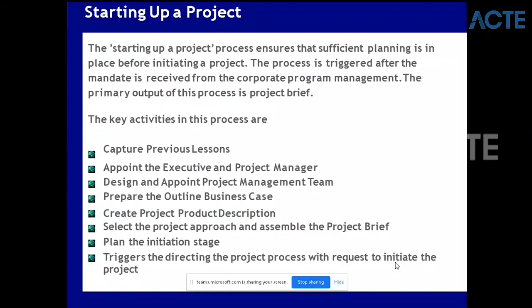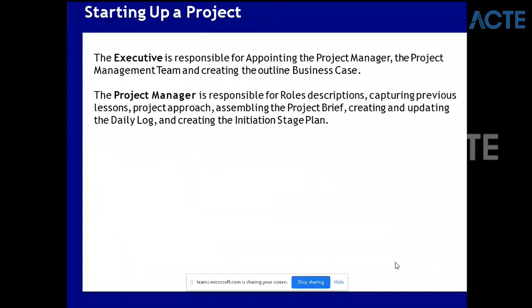The outline business case - the outline just contains the basic points of the business case, like what is the project and what is the outcome, at a very high level. In the initiation phase you will go into detail - this outline is only for getting approval from stakeholders. During Starting Up a Project, the executive is responsible for appointing the project manager and project management team and creating the outline business case. The project manager is responsible for role descriptions, capturing previous lessons, project approach, assembling the project brief, creating the daily log, and creating an initiation plan.